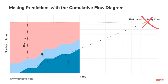Furthermore, as time goes by there will be variability in both the backlog and average throughput, so the intersection point will probably change. Straight line projections also don't provide a date range. Even if you draw pessimistic and optimistic lines for both the backlog and throughput to produce a date range, you're still making that assumption based on intuition and not historical performance data — and this approach doesn't provide the probabilities of hitting that date range. If you really want probabilistic forecasts, you should use tools like the cycle time scatter plot or Monte Carlo simulation.